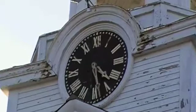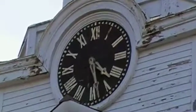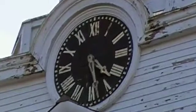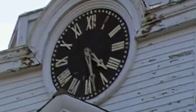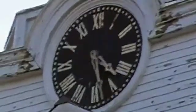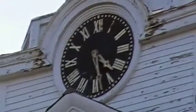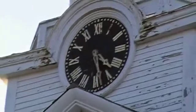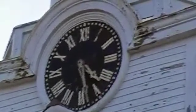There are many facets that make up the $230,000. There's the actual work on the steeple itself and the roof, but also the scaffolding. In order to do this type of project, the EPA is going to require certain regulations to be met, and the scaffolding itself is going to be $25,000, which is going to be split between the town and First Parish Church. There's also a number of repairs that need to be done, which is scrape, prime, and paint the towers, the belfry, the lantern, and the spire.